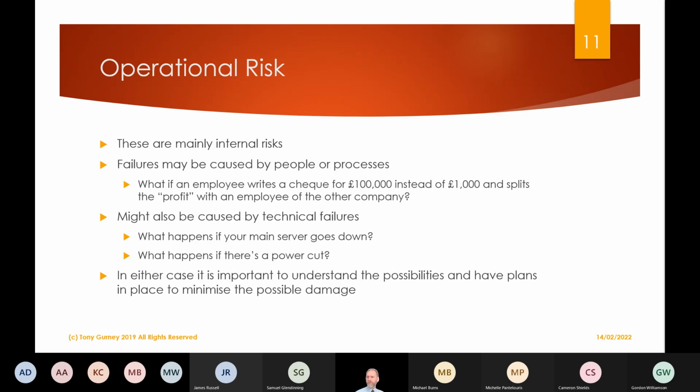And you point to the document saying 99% uptime, and that's what we've reached, before someone gently points out to you that the organization runs 365 days a year. So 99% uptime means that almost 4 days a year, you don't have a server. That's a risk.